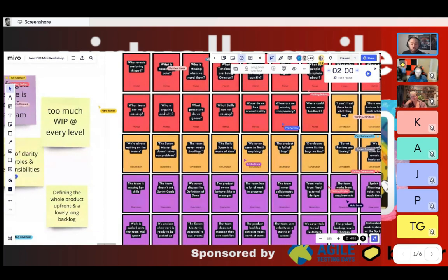The orange cards, the conversation cards, give you examples of the sort of things that you might overhear that, again, give you places you might probe for more information to build out that funnel. So, we never seem to finish anything. That's something that's really interesting to hear, right? And we talked about WIP limits earlier, work in progress limits being a common source of problem. Well, the way that might come out in conversation is the team saying that we never seem to finish anything, right? That's an indicator of that potential problem.